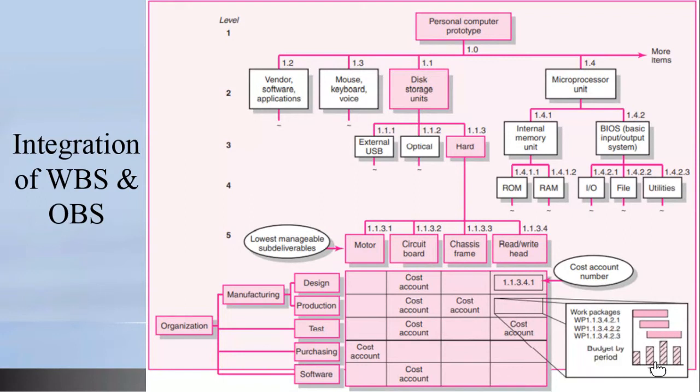You need to indicate a cost, what is the budget, as well as the time required to produce each of them. So what we find out is that production is responsible for 3, whilst testing has to be done as well. So the testing unit has responsibility for one of the cost accounts. That is why you have the 4 costs here.